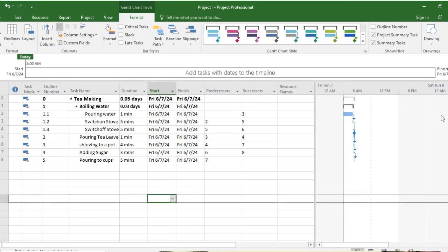These things are actually plotted here. And for all the serious and realistic projects, this will happen just like this if we add the names first, then the predecessors, successors, then the duration, then we auto schedule it. Only then can we make the projects according to our will.